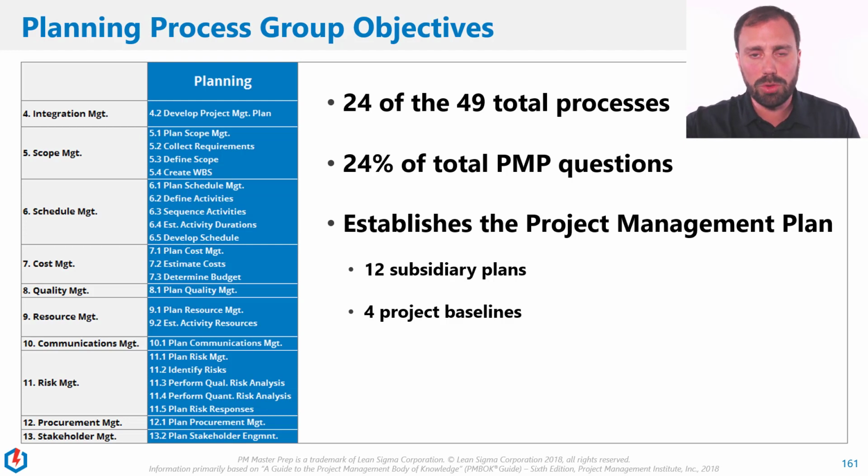Because think about when you go into a project. What do your bosses and everybody else ask you? How are we doing as far as the process goes? And that's all in the earned value management section, which we define really well later. But they're going to ask you, how are we doing? You're going to integrate those three things in the performance measurement baseline. You're going to say we're ahead or behind of what we thought our baseline was, which is our prediction for the future for what we should be at certain points. So that's what we're trying to do here.